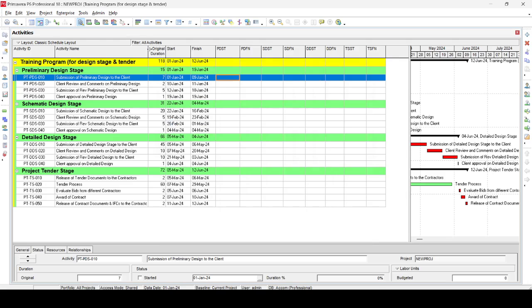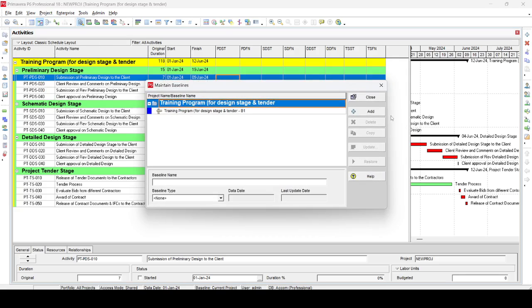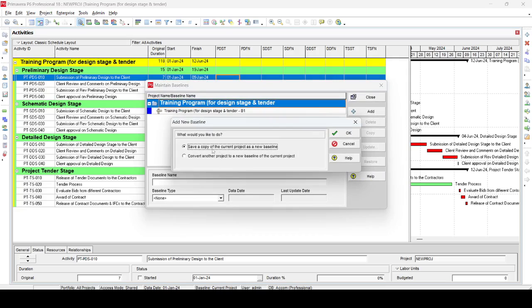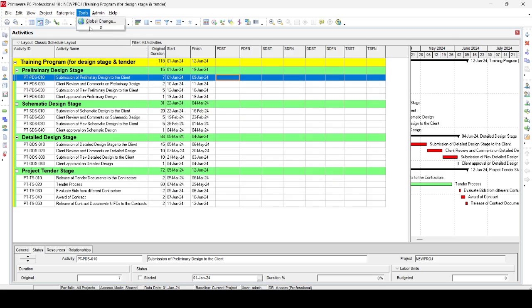Before making any changes, make sure you have a copy of the program. One way to make a copy is to go to Project, then Maintain Baseline, and add a save of the current project as a new baseline. This copies the program as a baseline, so if something goes wrong you can retrieve the data and your original program remains unaffected. I have already made the copy, which you can see here.